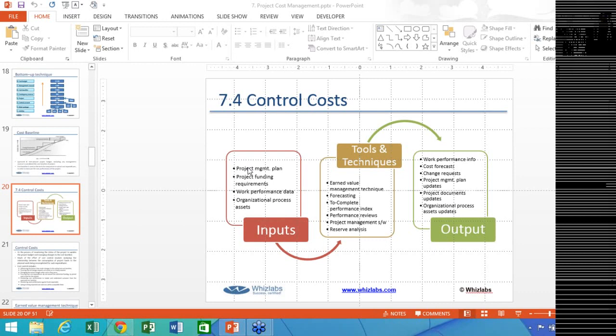In that case, you need to write a proposal to the customer and explain the entire situation, that we have more work but unfortunately less amount of money. And you need to give justification for why you spent more money on the work you have already completed. So you need to come up with a business case and convince the customer so that he is ready to give more money. Or if they say no, then as a vendor, you need to shell out the money from your own pocket. That means there would be a dent on your profit.